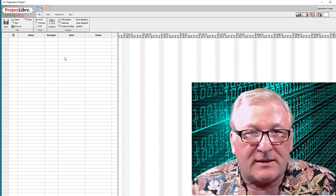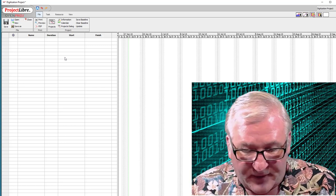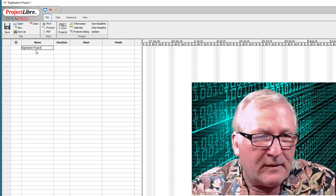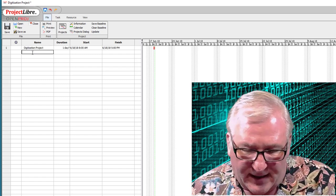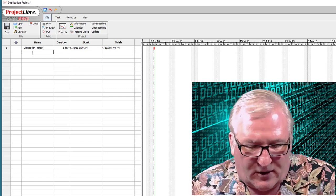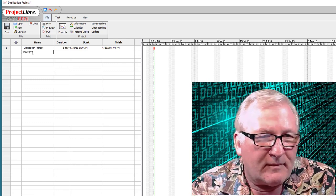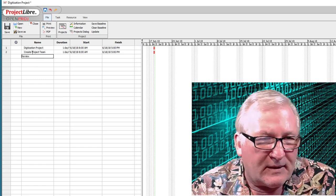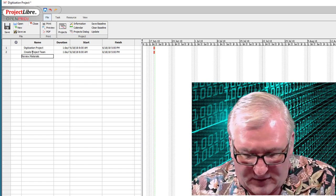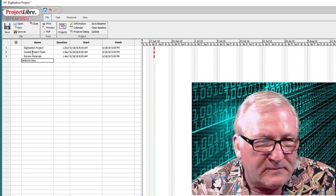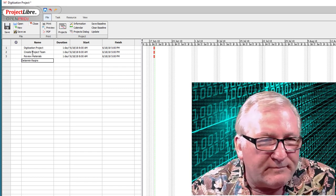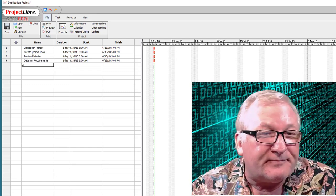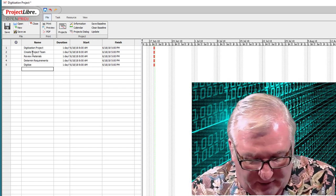The first thing to do is go ahead and enter your task list. Presumably this is something you flushed out in your planning process. I'm going to call this our digitization project. Our task baskets will be: Create the Project Team, Review the Materials we're going to digitize, Determine our Requirements, Digitize, and then Bring the Repository Online.